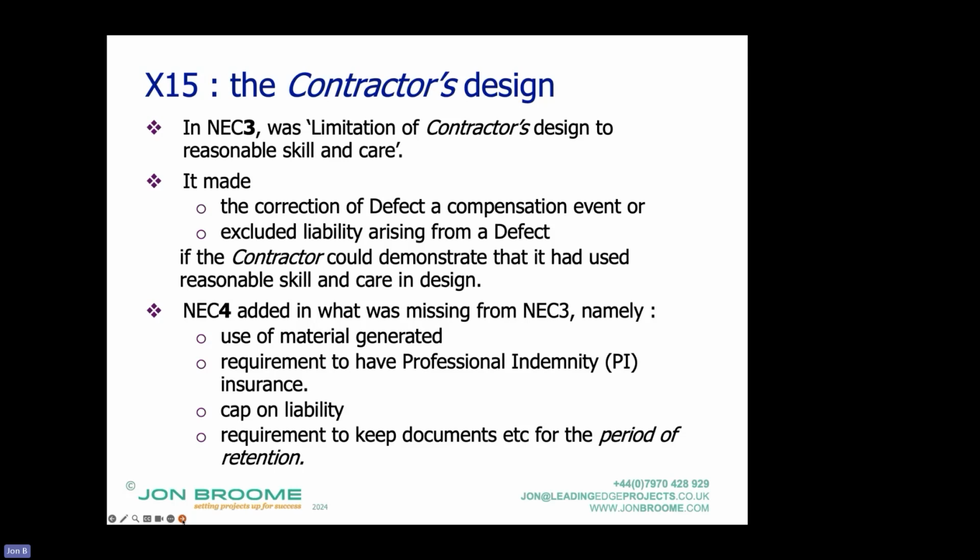But I'm a contractor and I can't get insurance for fitness for purpose for design. I can get it for the other two, but not design. And also I'm far more likely to subcontract it out to a design consultant who cannot get insurance for fitness for purpose. They can only get it for reasonable skill and care.